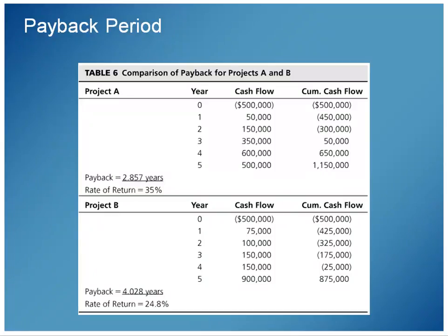And Project B shows that example as well. I can eyeball it just by doing the $500,000 up front and then knocking that debt out with my income each year. I can see that sometime after the fourth year and during the fifth year, that goes positive. But the calculations for doing those are beyond the scope of what we're doing here. What we're talking about here is just that there is a payback period that we can figure, at which point is a break even for the investment.